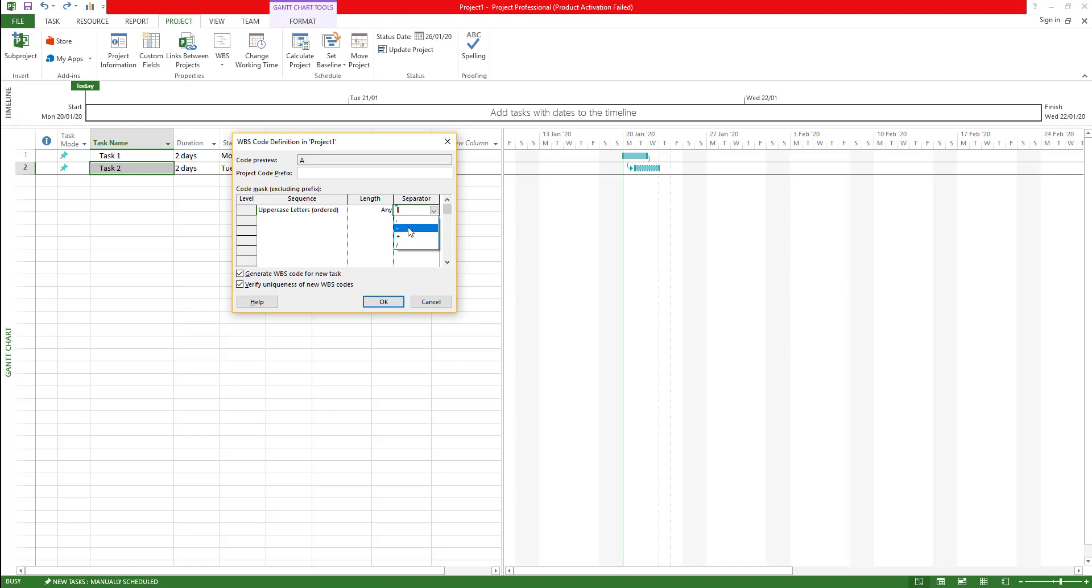You can use a dash, plus, whichever separator you want to use. Make sure that you don't use the slash unless it is needed. The reason being is these task names sometimes may also be used in a file name. If you have a task that says pavement cleaning and there's an invoice or some document attached, if you want the file name same as the task name, if you have a slash then you cannot have slash on the file name. Simple as that.